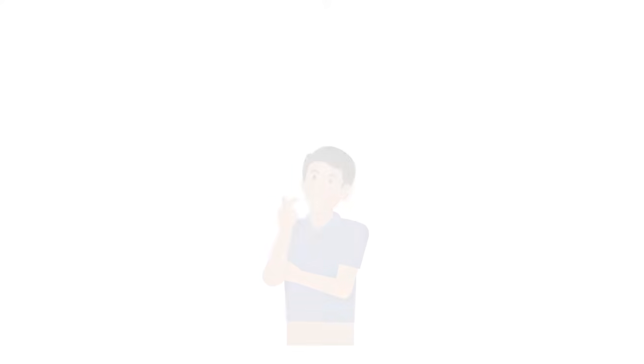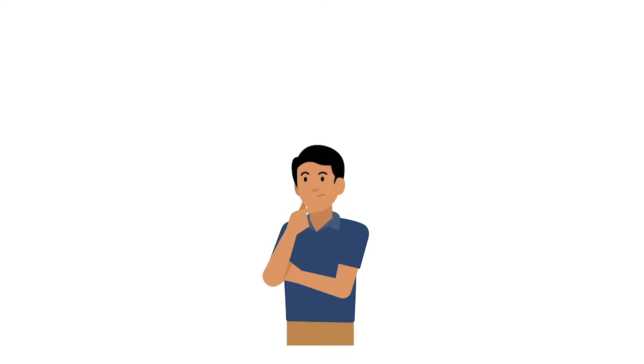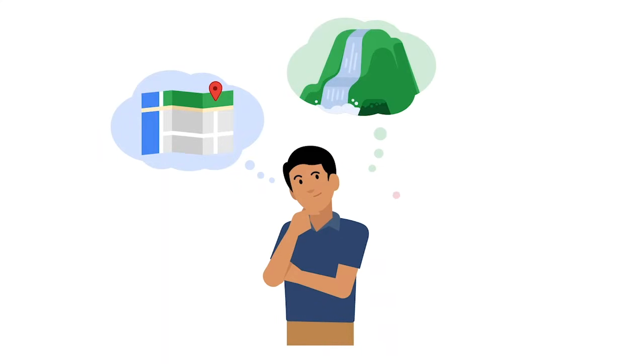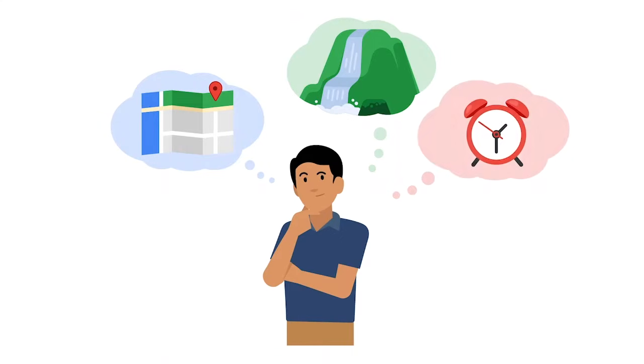Before you continue on with your project, you'll need to decide which tracker makes the most sense. If you need to communicate milestones to a large team, you might choose a roadmap. If you have a project with multiple dependencies, you might choose a Gantt chart. If tracking tasks against your deadline is especially important, then the burn-down chart might be your best option. And you may even decide to use more than one.